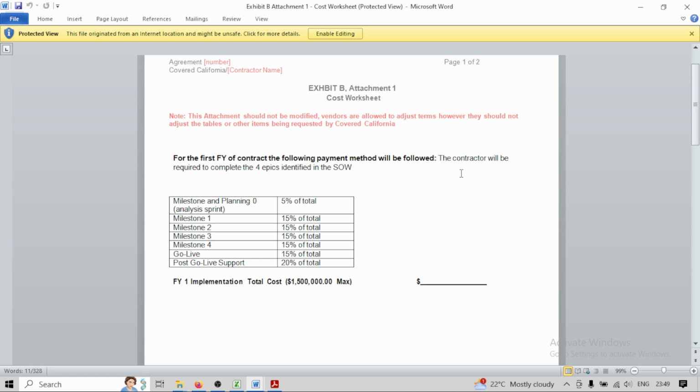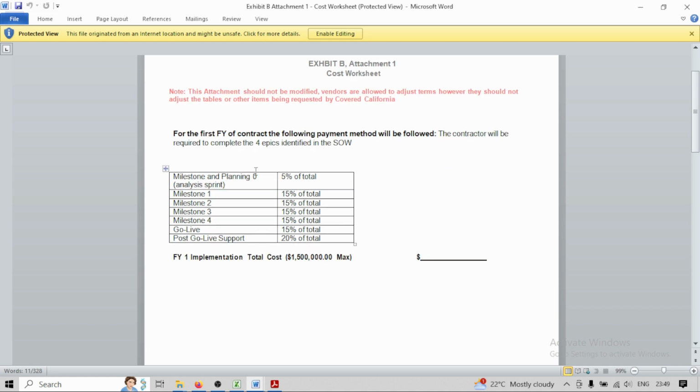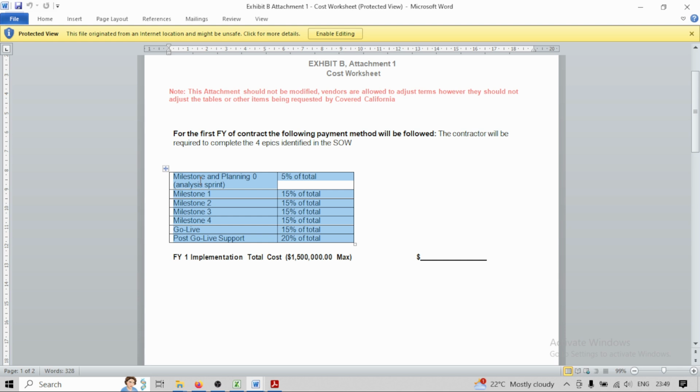What will happen in discovery? How much will you charge? What will happen in the UAT phase? What will happen in the SIT phase? Or what will happen in sprints? What will happen in hypercare? So this particular public sector is actually asking for a milestone basis cost: milestone 1, 2, 3, 4. Not to confuse with the project management, once we are into the project.